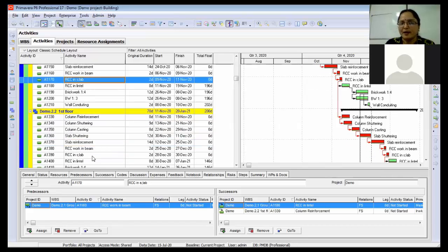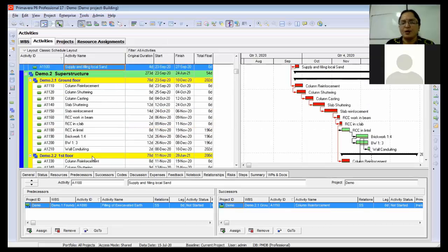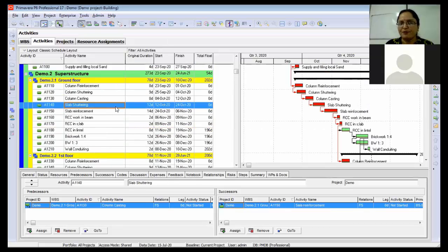Then we should develop a realistic schedule. For the schedule we have to define the dependencies because we cannot start all the work together. So we need to specify the relationships, the dependencies amongst these activities in order to find our critical path. Because the significance of the critical path is, as you all know, that we understand where the project manager has to put entire focus so that he can complete his work on time.